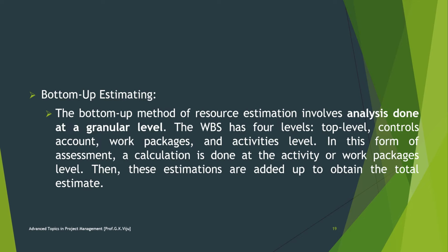Breaking down the complex activities into pieces and working out the resource assignment for each piece. It's a process of estimating individual activity resources needed or cost and then adding these up together to come up with a total estimate. Bottom-up estimating is a very accurate means of estimation, providing the estimates at the schedule activity level are accurate.